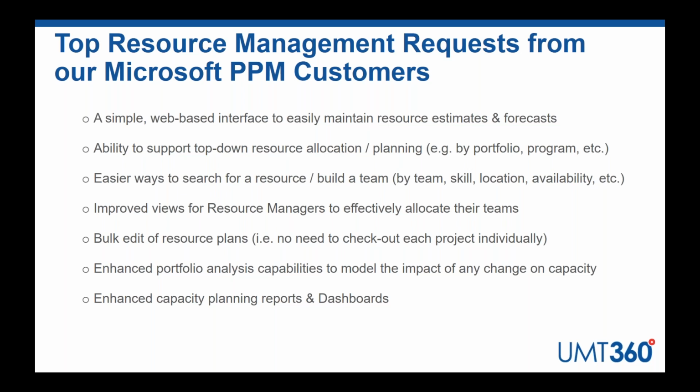As I said, the resource engagement model that Microsoft released in Project Online is a significant step forward, but there are certain improvements that our resource managers have been asking for that we have allowed for in the roadmap for our Resource Manager app. One of the key ones is bulk editing of resource plans. If I'm managing 10 projects or I'm managing a bunch of people in my team, I don't want to have to open up each project individually to update the resource. I want to be able to do it in one place where I see all my projects, all my people, and I just do it in bulk without having to check in and check out each project individually. Very, very important.